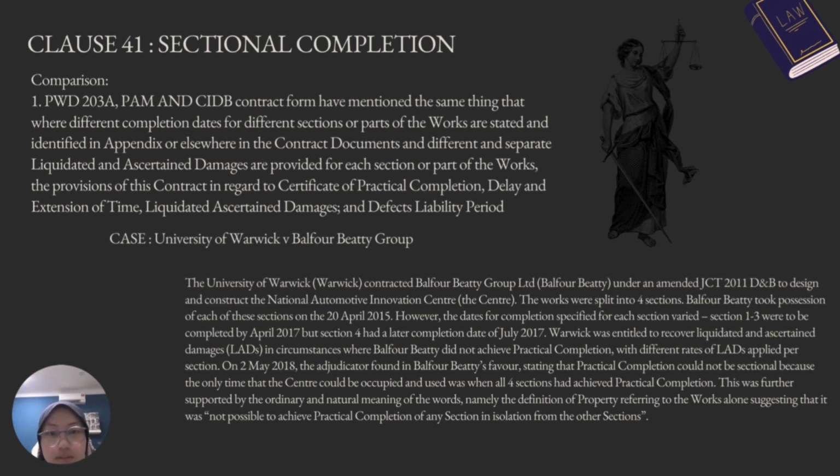of July 2017. Warwick was entitled to recover liquidated and ascertained damages in circumstances where Balfour Beatty did not achieve practical completion, with different rates of LAD applied per section. On 2 May 2018, the adjudicator found in Balfour Beatty's favour, stating that practical completion could not be sectional because the only time that the centre could be occupied and used was when all four sections had achieved practical completion.